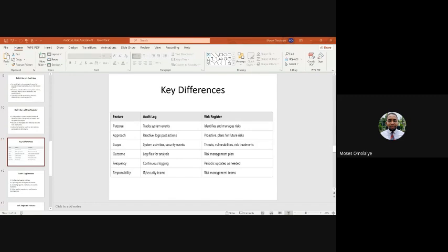Then the risk register process is you first of all identify potential risks, then you assess impacts and the likelihood of that risk. Meaning, if this threat goes through, what is the possible impact, and what is the likelihood that this threat can exploit the possible vulnerability. Also, I want to point out that because something has a high likelihood doesn't mean it will have a high impact. Another one could have a low likelihood of occurrence and have high impact.